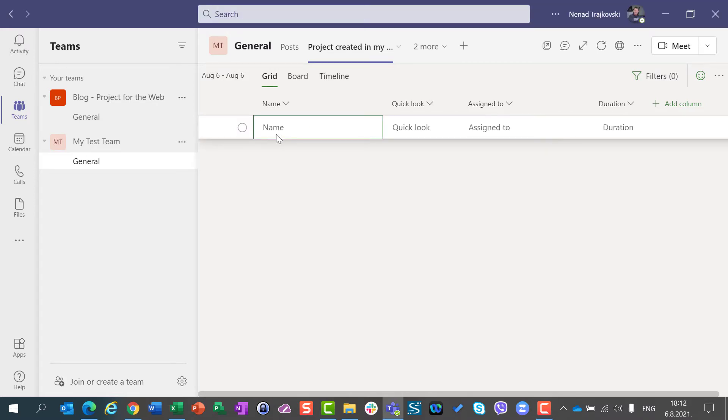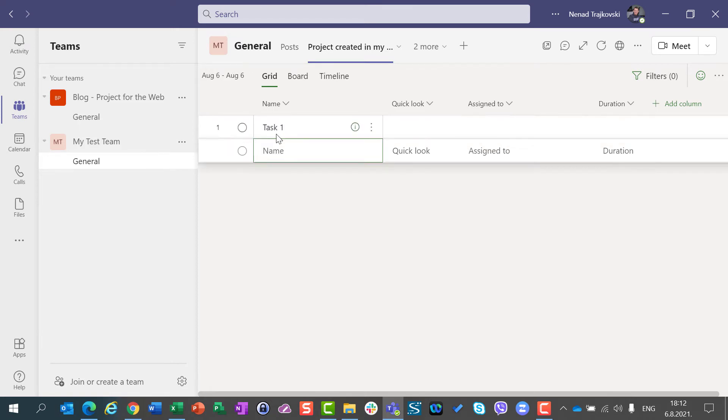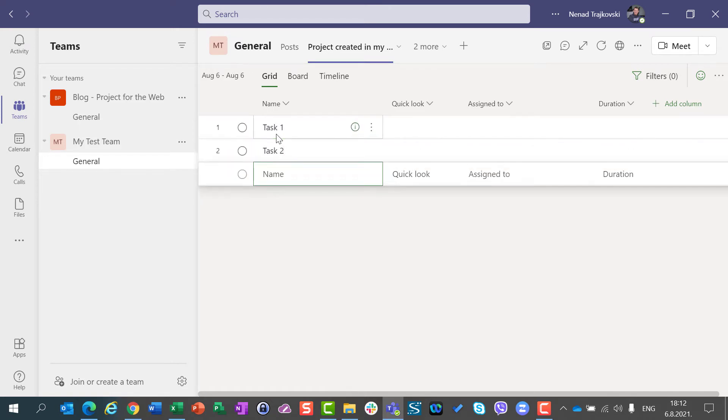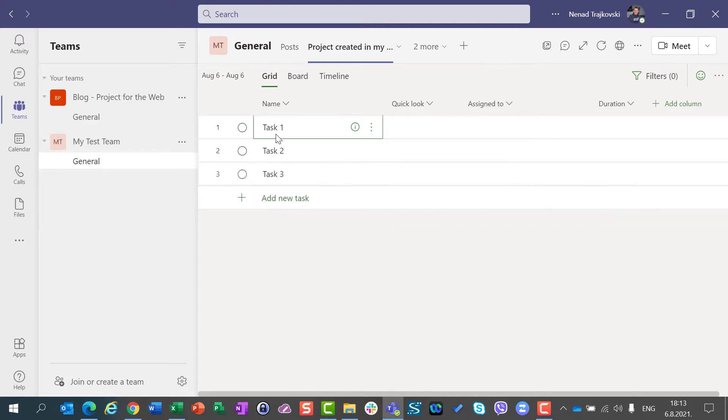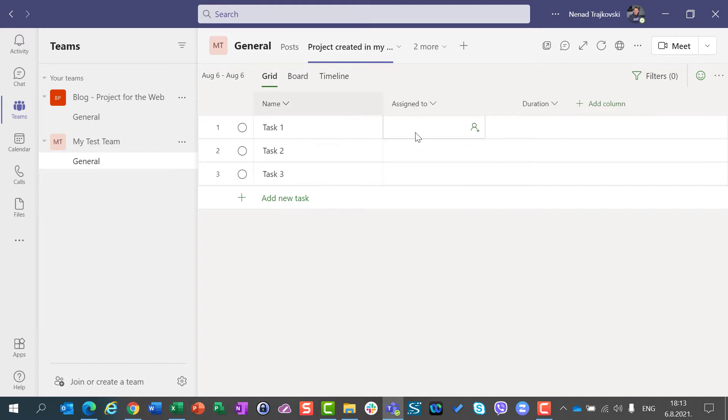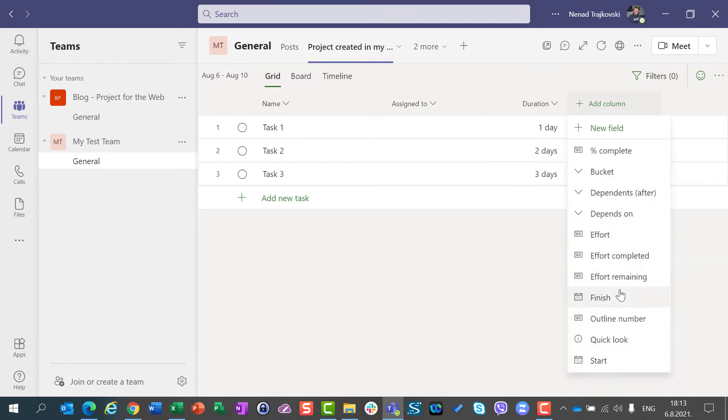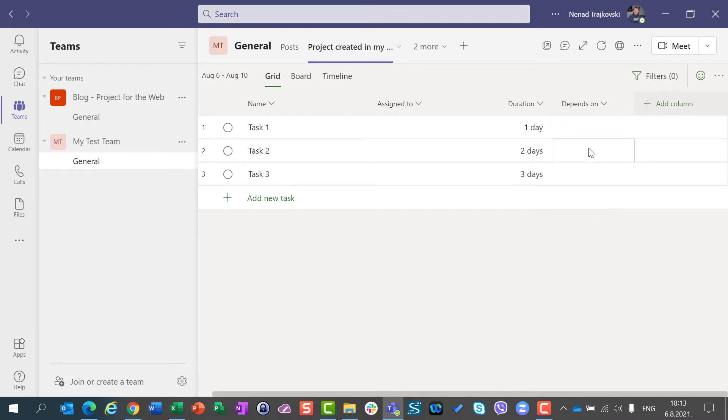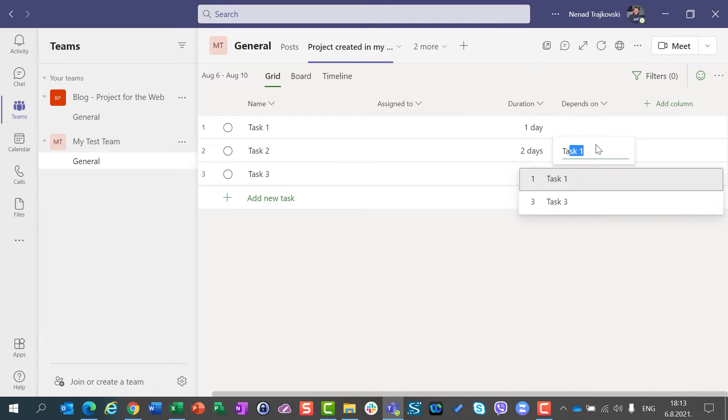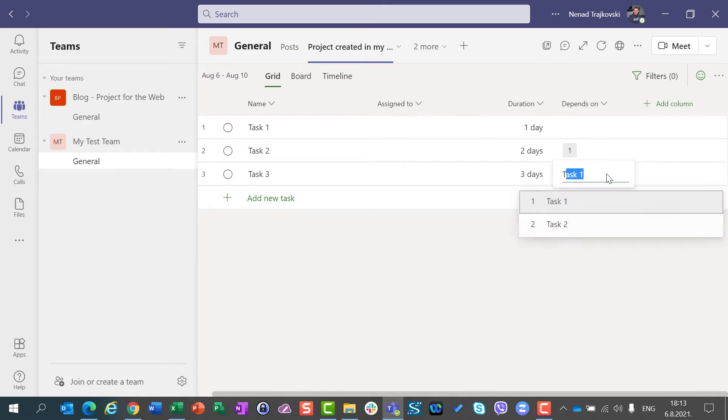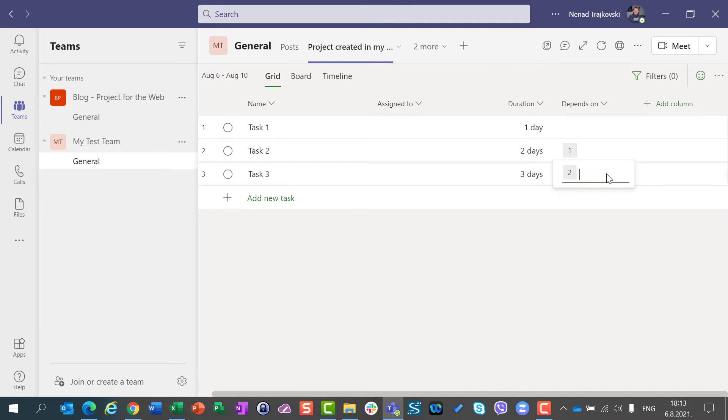Let's create three tasks very quick. I will remove the quick look column. I will say that they have duration one, two, three days. I will put depends on, let's say task one, and here task two.